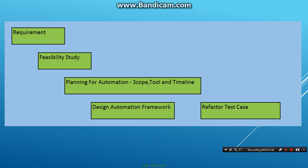Then there is technical feasibility. A company might currently have certain tools, and the application which needs to be tested would be built on certain technology. A study is done to check whether the automation tool works well with the application under test. If it doesn't, what other tools are available, and whether they have people to work with those tools — those kinds of aspects are studied.